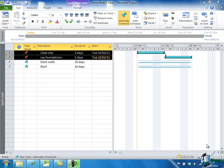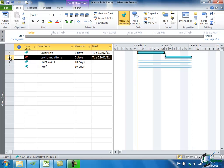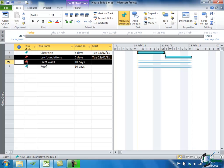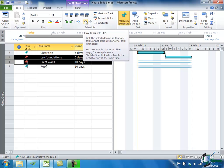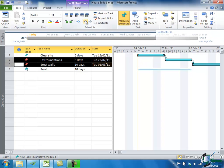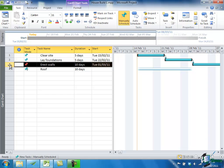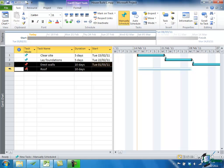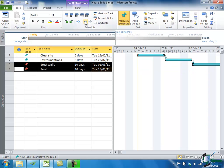And of course, it's very easy to see what's happened because we now have a proper sequence of events with Clear Site followed by Lay Foundations. And it would be no surprise to learn that if I now click on the second task, Lay Foundations alone, and then hold the Control key down and select the third one, Erect Walls, and click on Link Task again, basically now Erect Walls won't happen until Lay Foundations is finished. Let's repeat that one more time for the last pair of tasks, and there we are. We have all four of our tasks in sequence.